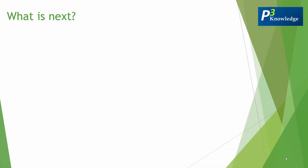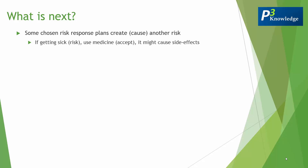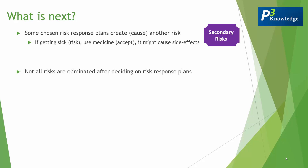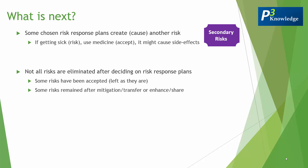After selecting your strategies and defining an action plan for each risk, what comes next? First, bear in mind that some chosen risk response plans can create or cause another risk — for example, using medicine to deal with getting sick might cause side effects. Those are called secondary risks. Also, not all risks are eliminated after deciding on response plans, because some risks have been accepted and some remain after mitigation or transfer. Those remaining risks are called residual risks.